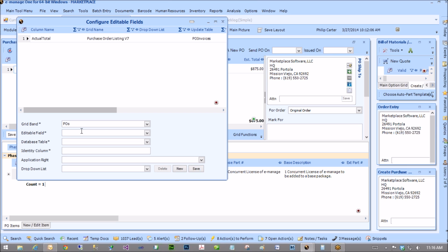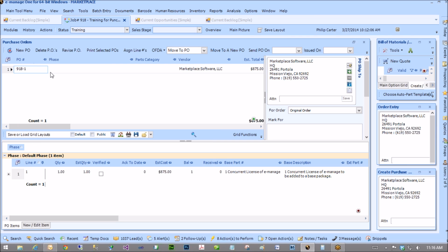You'll do the PO number, okay? And it's the project purchase orders table. And then you can go right in here to the PO number and just put PL at the end of that, okay? Just for your own reference, so you know that that purchase order is for punch list. And just so you know, you can always change this number on any purchase order.